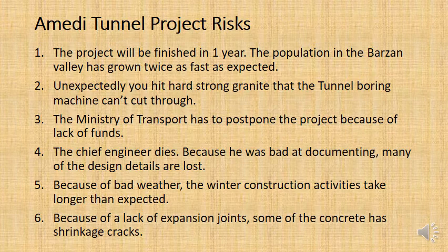Now, if you hit hard granite, potentially the tunnel boring machine that you have isn't strong enough to break through the granite, and suddenly you need to look at doing something like dynamite or getting another tunnel boring machine, and that could be very expensive and cause big delays.